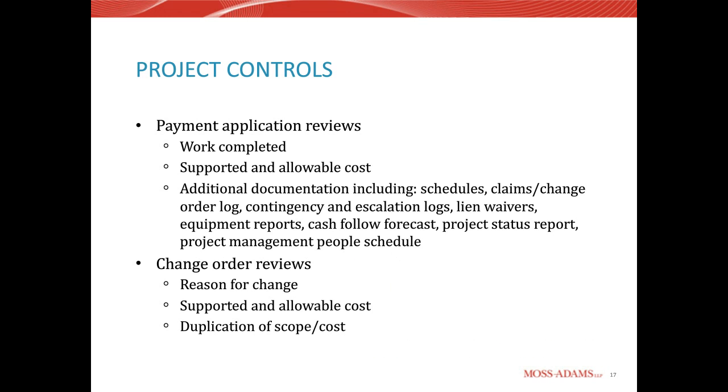As far as project controls, payment applications and change orders are going to be your two primary sources of submission of billings and setting up budgets. And so you want to verify that the work that has been billed has actually been completed, whether that's through an on-site walkthrough on a monthly basis, just to view: does what we're being billed for align with work that's actually been performed?